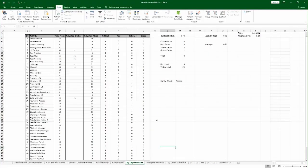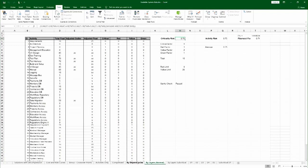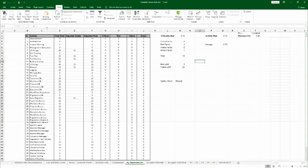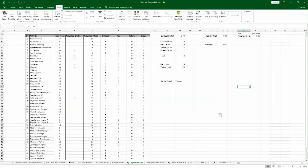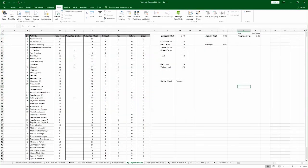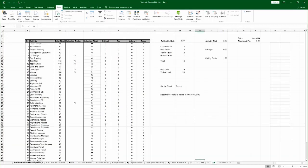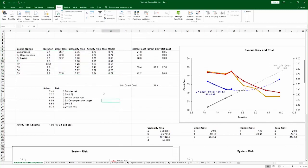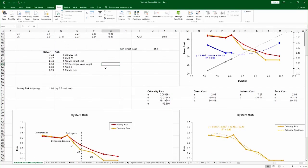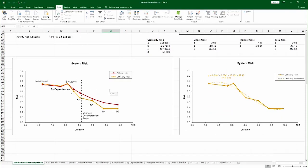On the right-hand side of the file, you see tabs for the various solutions, risk calculation. Please see the how-to video on how to calculate the risk for the various solutions. And you can see even the decompression points here. All those values are populating this table over here. And you can see here the raw risk curve, activity and criticality. Now you can see they don't match exactly. And the reason is activity risk is skewed somewhat higher in this project because of risk outliers.